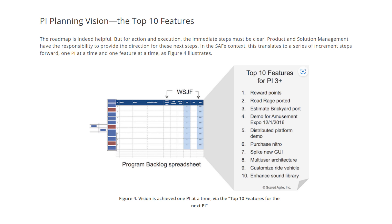You can prioritize the program backlog using WSJF — Weighted Shortest Job First. Each PI objective should talk about the top 10 features we are going to achieve in that particular program increment. This picture talks about the top 10 features in Program Increment 3.